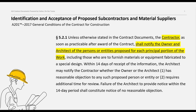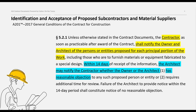So, with that, let's get into it. Section 5.2.1 of the AIA A201 General Conditions for the Contract for Construction contains two key components. First, the contractor is required to notify the owner and architect of the persons or entities proposed for each principal portion of the work. Second, upon receipt of the contractor's notification, the owner and architect have 14 days to reasonably reject any of the proposed subcontractors or suppliers.